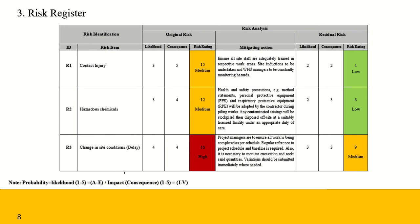The risk register is commonly used in project management. It can be defined as a framework for managing risks identified by the project stakeholders. For each risk, the register tracks information such as risk items, likelihood, consequences, and mitigation activities. You can see a risk register example here.